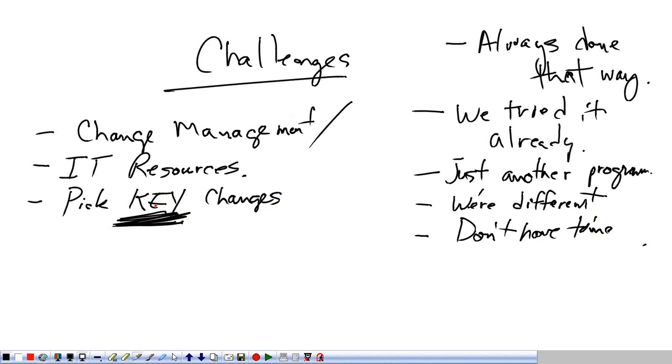Lots of improvements could be made. And in the end, they decided to try to enact like 17 or 18 changes. And guess what? They didn't package it well, they didn't communicate it well, and change management just killed them. Because they got to the point where people didn't want to have all these different things coming at them. Many of them were IT.